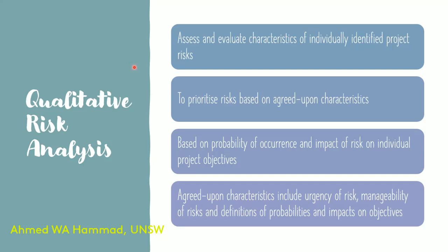upon characteristics. Now, these characteristics are defined by the organization, and it's a reflection of things such as the urgency of the risk, how risk averse or risk loving a particular organization is, and the probabilities and the impacts that are perceived by that organization.